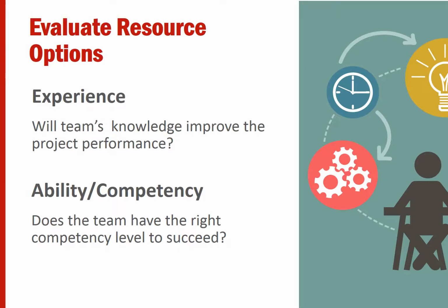In case you figure out certain gaps in the competency level required, you will need to come up with a clear gap analysis and approach it through training and coaching. Otherwise, the resources that are being assigned to a given project might not be in a position to perform effectively.